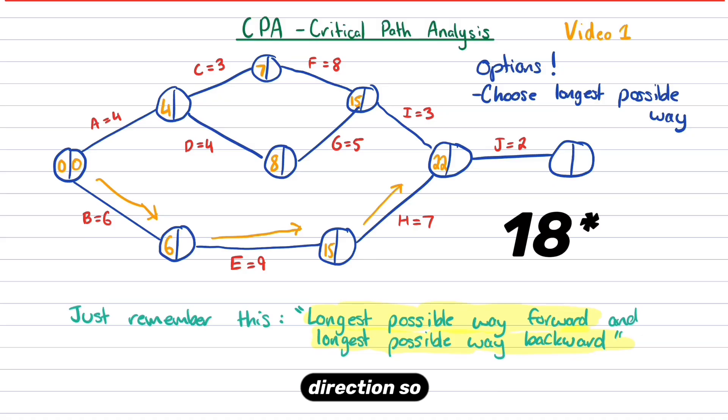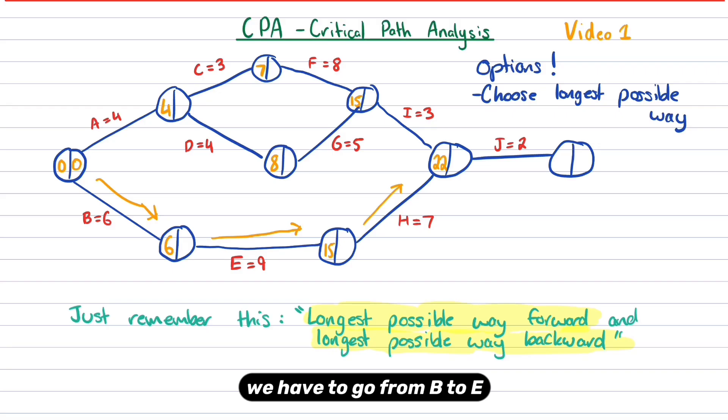If we went the middle direction, so four, four, five, and three, that's going to be eight plus eight, which is 16. So that's not the longest possible way. So we're going the longest possible way, which means we have to go from B to E to H. Therefore, we're going to have a 22 in that box.